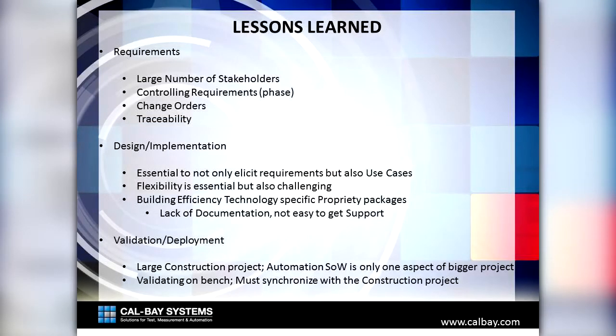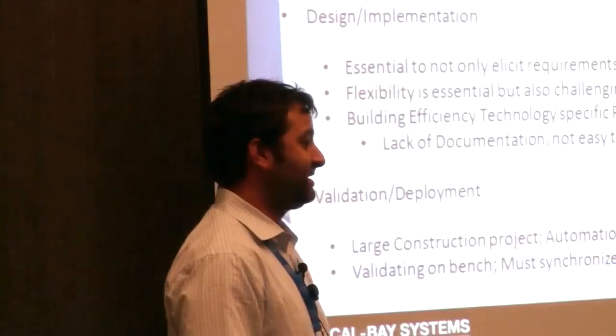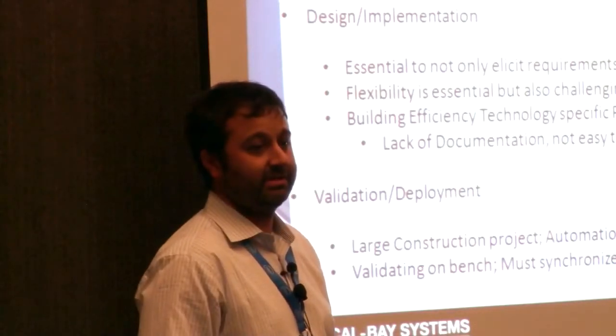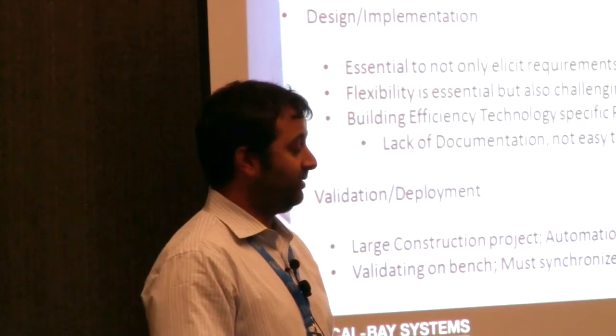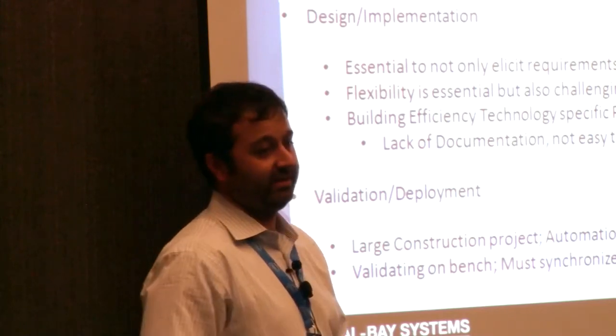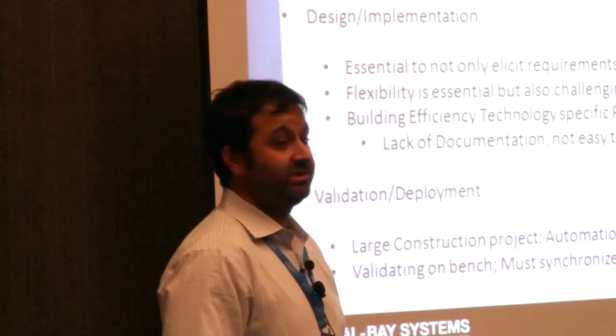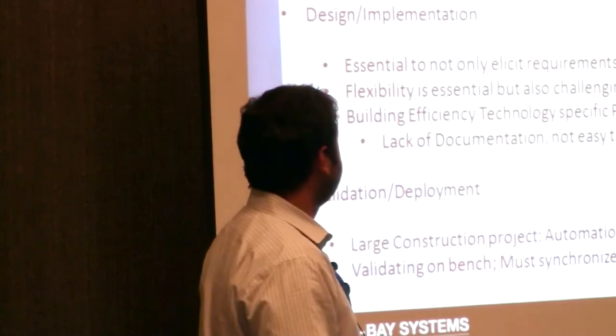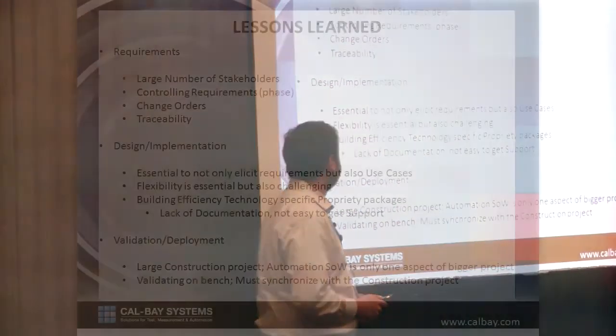So I mentioned that we've been working on this for over 3 years now. Not 3 years of development, but 3 years of requirements gathering activity and design. And there's a variety of lessons learned from this activity. In this case, there's a huge number of stakeholders that we need to satisfy. And just to gather the requirements from all these different stakeholders, identify the gaps and overlaps, is a huge challenge. And I would list that as the #1 lesson learned.